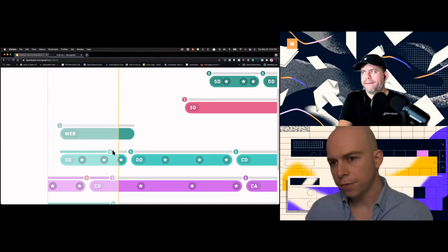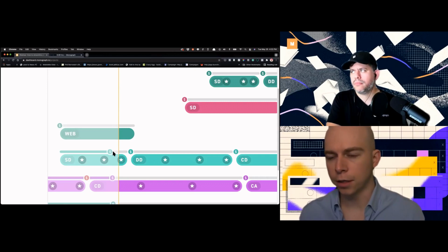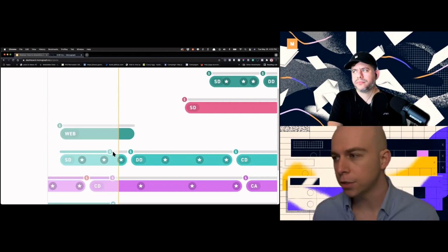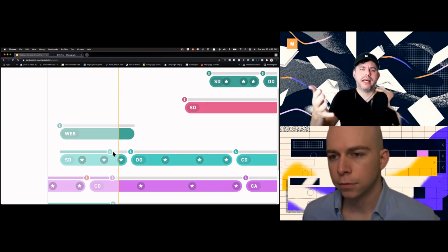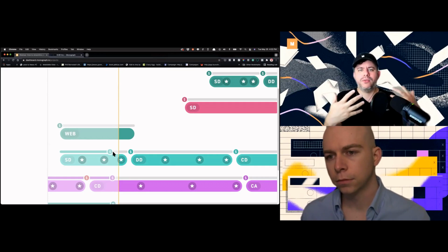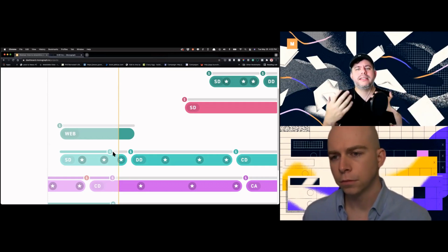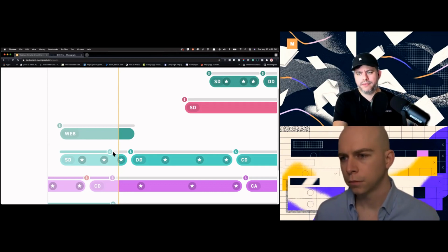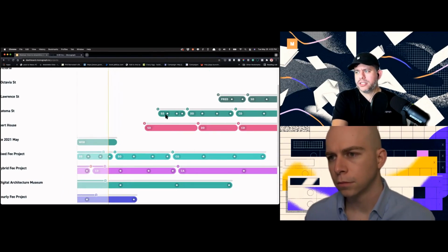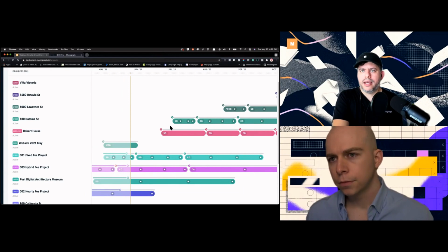We're a little bit off track in a sense, right? Because the money's behind the time, so it could be that we have some budget left, but it also could be that there hasn't been enough attention on that project. Correct. The qualification of how that looks is more specific to the project progress, but at least it gives you a really high level view and visibility into where we are right now with any given project. And you can see here, things in the future haven't yet been allocated any time.